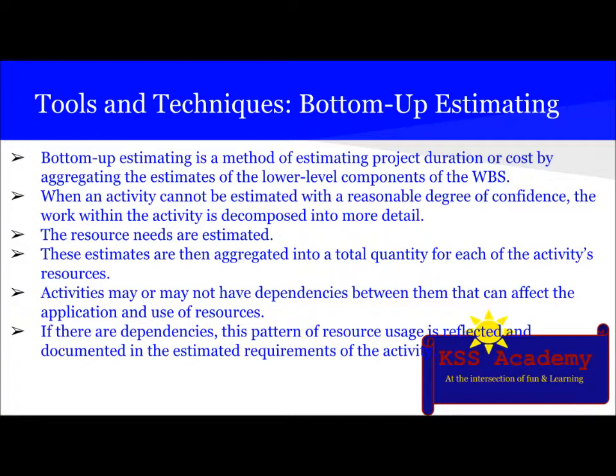The resource needs are estimated. These estimates are then aggregated into total quantity for each of the activities resources. Activities may or may not have dependencies between them that can affect the application and use of resources. If there are dependencies, the pattern of resource usage is reflected and documented in the estimated requirements of the activity.